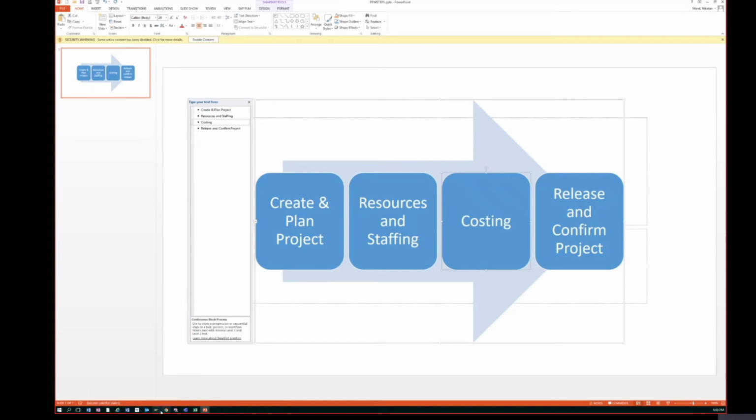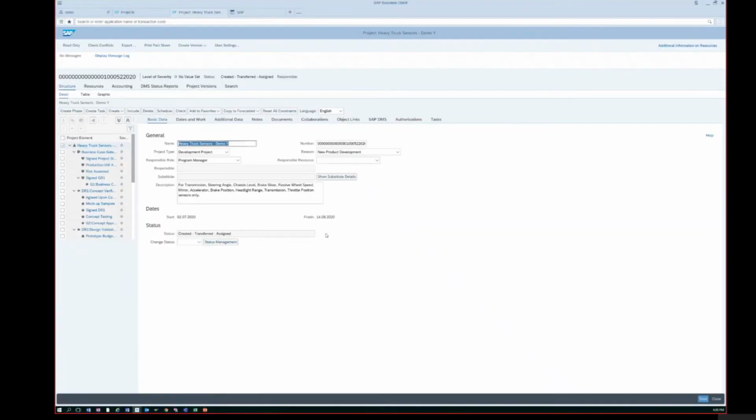So how release works is, when you release a project definition, it automatically releases the next phase, which automatically releases the subordinate tasks associated with that phase. Once you release the task, phase, or a project definition, we cannot change the project definition type, the phase type, and the task type. Also, the scheduling which automatically happens at creation no longer happens automatically for the released project elements.